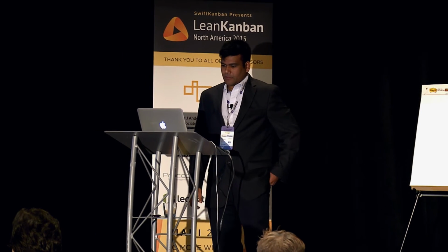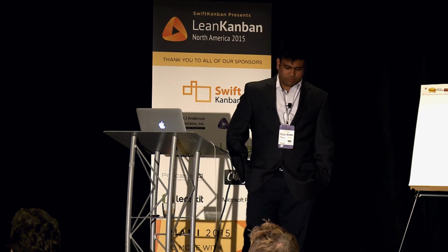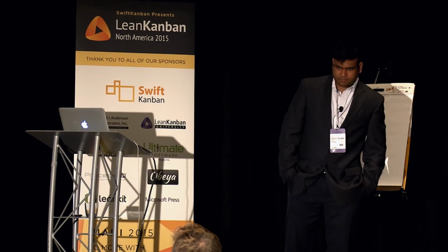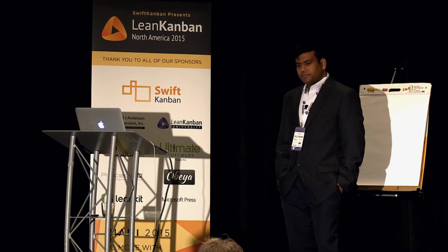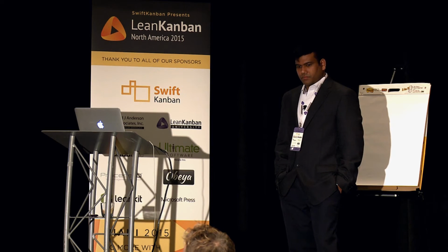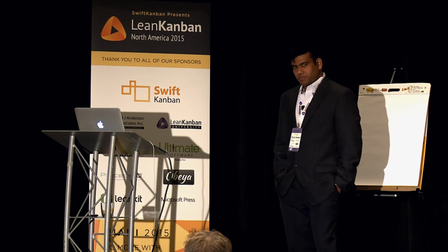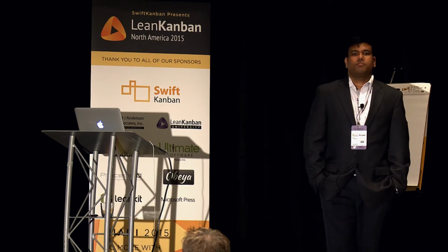To deliver this functionality, we have to undertake some very complex data retrieval and manipulation, complexity driven by the many disparate systems we have inherited from our acquisitions of other banks. The work required to produce working slices of functionality simply can't be completed within a 2-week time period. More importantly, we are not here to improve the quality of our sprint reviews. Slicing stories to meet an artificial, process-based need diverts time and attention from the job at hand. We can't afford the distraction.